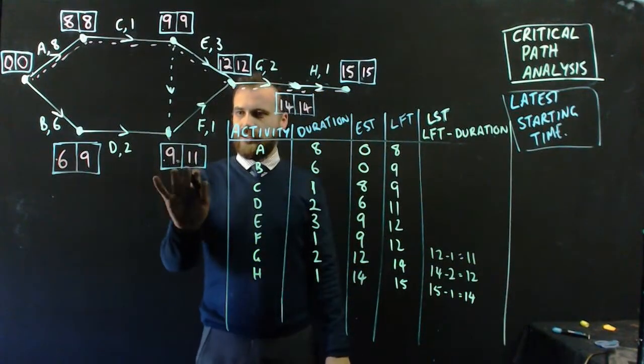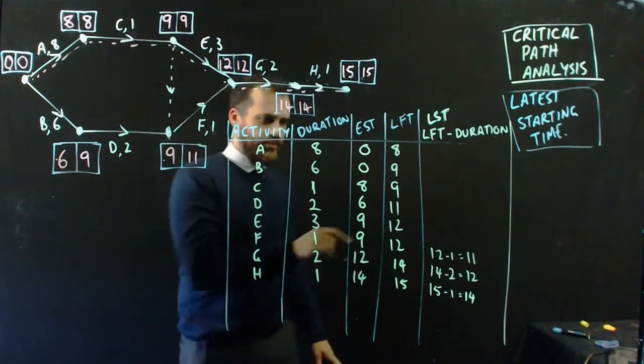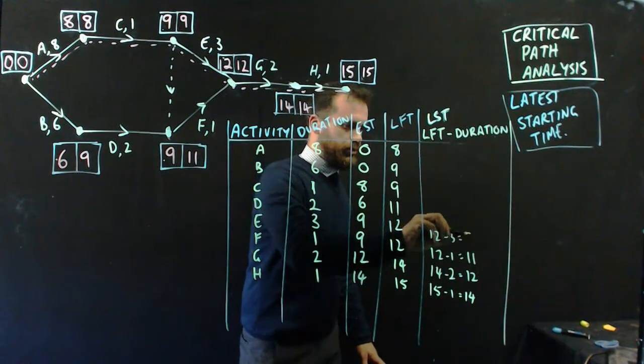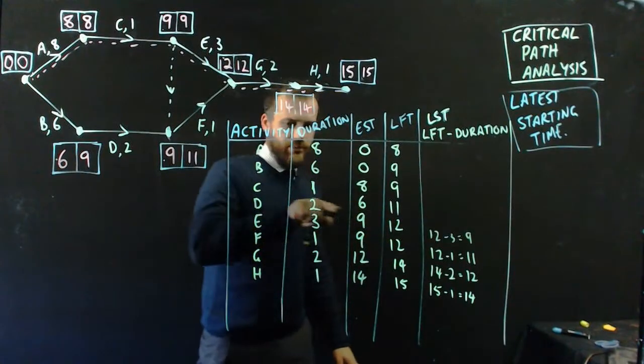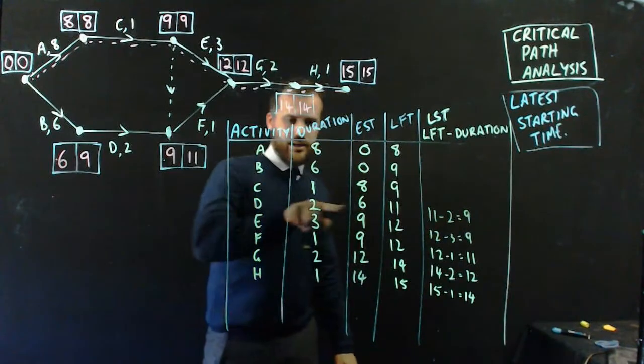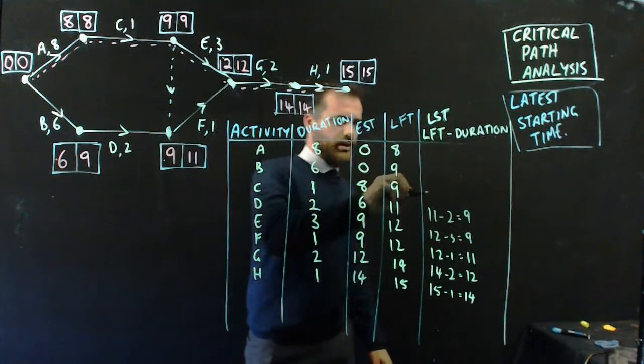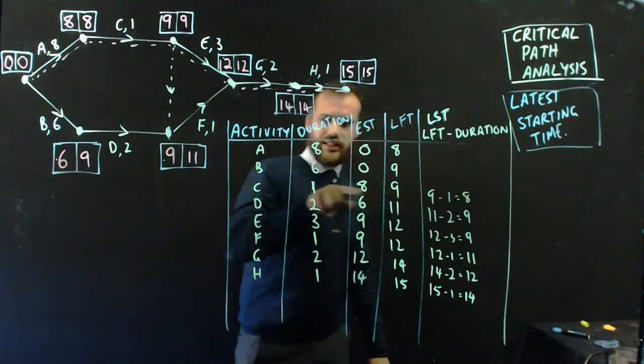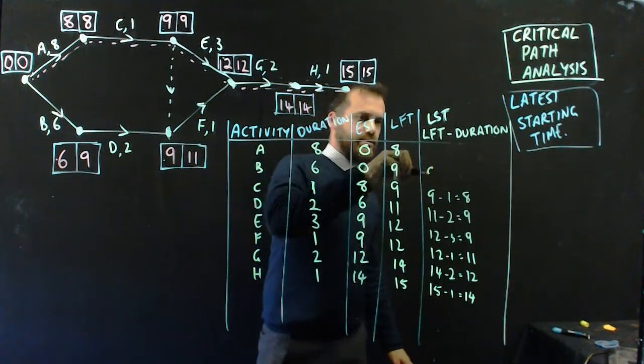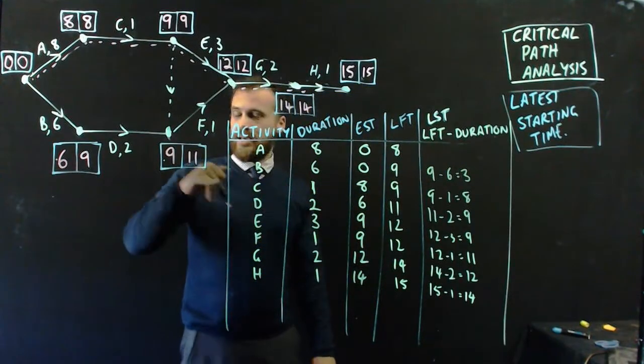We've got a little bit of slack time there. Okay, 12 minus 3 equals 9. That's when we'd better start E. 11 minus 2 equals 9. That's when we'd better start D, the latest we can start D. 9 minus 1 equals 8. That's the latest that we can start C and still get this done on time. 9 minus 6. That's the 3 hour mark. That's the latest that we can start B and still get this done on time.